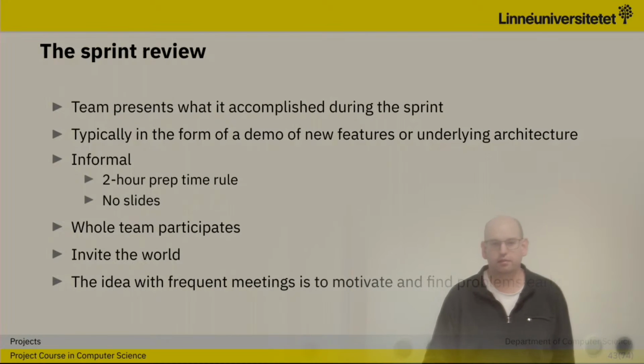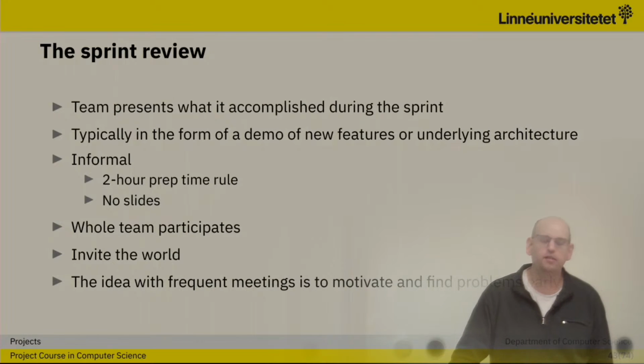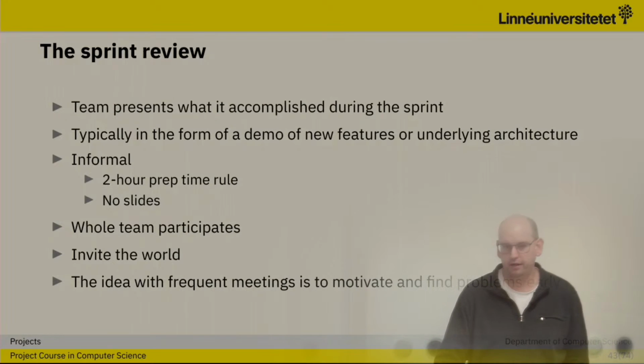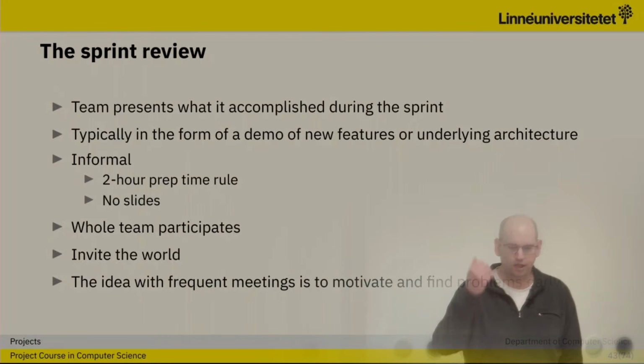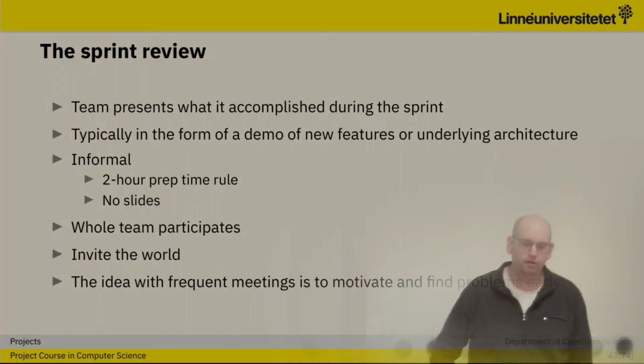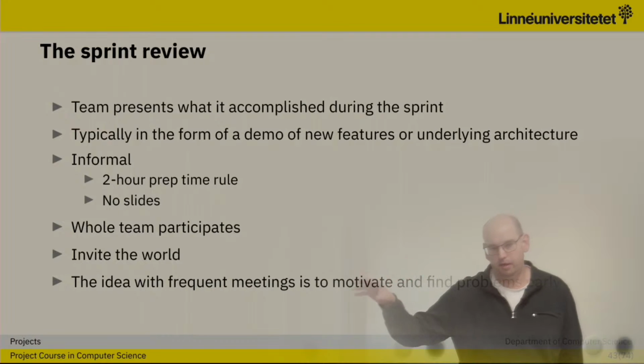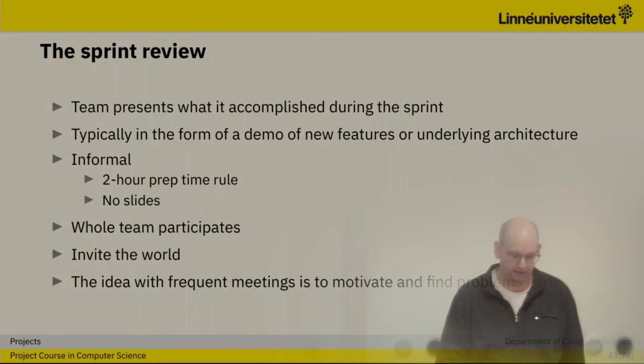No slides, a minimum of preparation time, but that doesn't mean you should come unprepared. You have something to show. See to it that you show that in the most efficient way possible. Instead of just saying, well, we've done this and this and this, try to use your user stories that you have. So, in order to do X, we have implemented Y, and you show that as a demo.